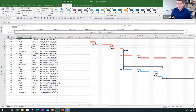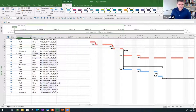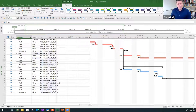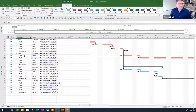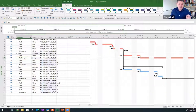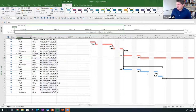Something I've deliberately let happen: there is no unique numbering system in Project out of the box. That's really difficult when you're talking about an activity like 'fit plasterboard' that appears in six different places in your schedule — nobody knows what you're talking about. One of the principles is you should have a WBS identifier for each activity. It is there, but it's not turned on — this is what I mean when I talk about the insane in Microsoft Project. Go to Format and there's a feature for Outline Number; press it and a unique numbering system appears for each activity. Instead of talking about Task 11, you can now talk about 2.4.